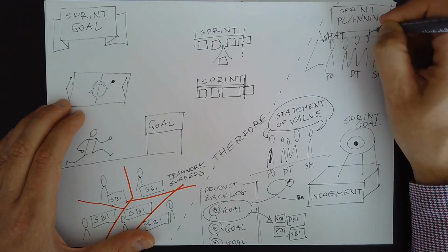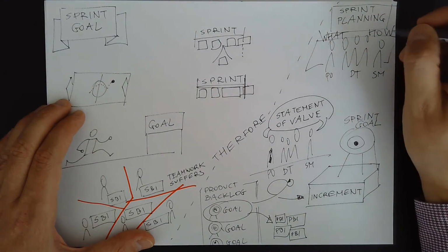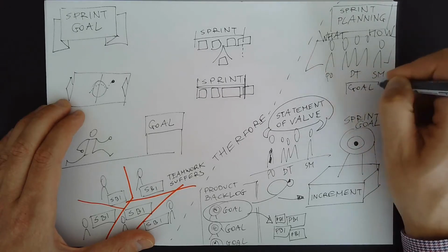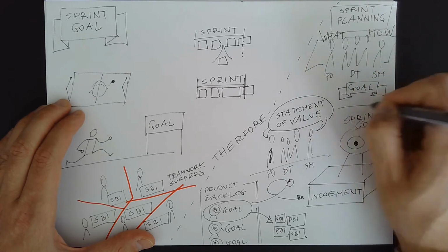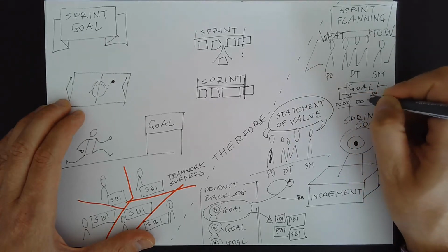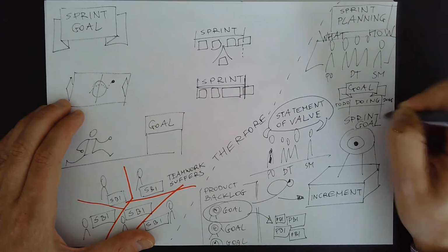The development team commits to the sprint goal. This sprint goal can help unify the development team, and it serves to build stakeholders' trust in the team. The sprint goal should be visible to the team, for example, put it on the Scrum board or another information radiator. The development team keeps the sprint backlog current during the sprint to support meeting the sprint goal.